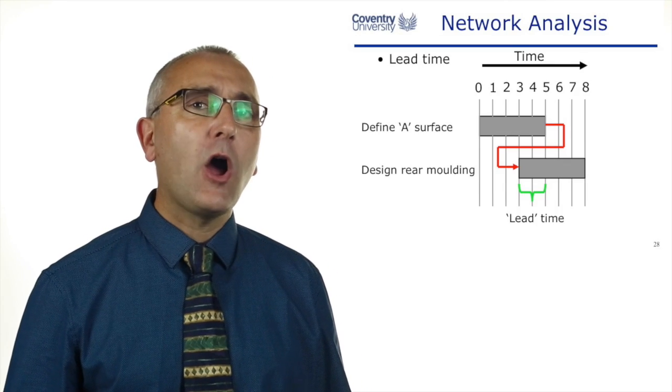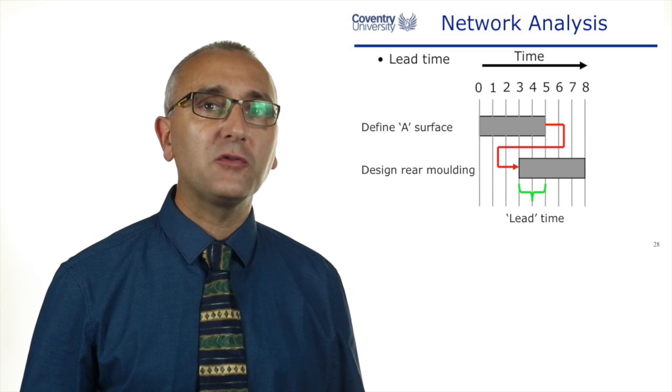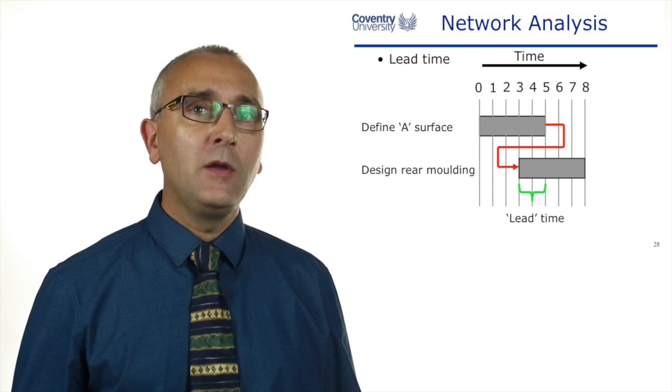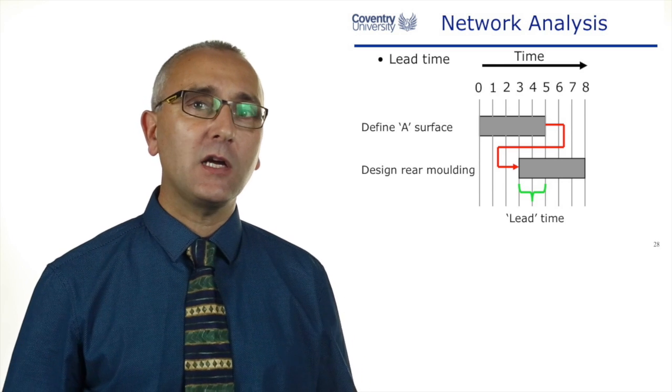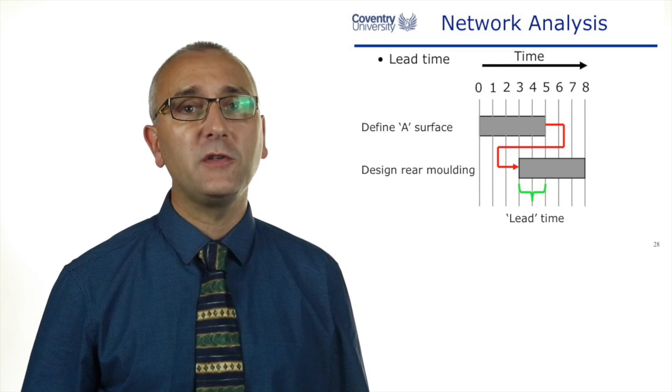Sometimes, tasks are overlapped. We had a look at this in lecture three, but lead time means there is an overlap between the two tasks. We can actually start the second task before the first one has finished.